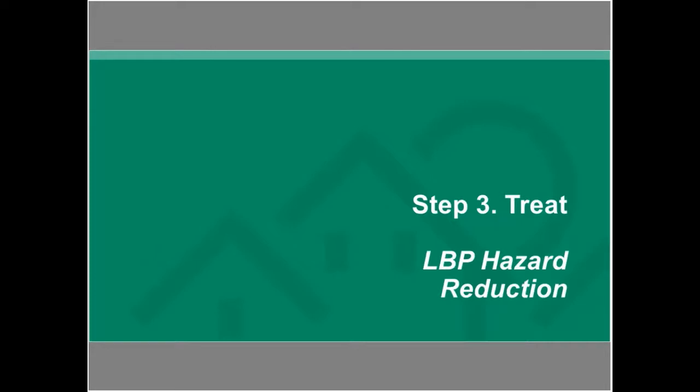Now, the nice advantage of a lead-based paint inspection is that information is good for the life of the building, and it can be used for any subsequent renovation work. Any contractor coming in can be provided that, and they would know what is and is not lead-based paint. So an important differentiation between a risk assessment and a paint inspection. So thanks for the interruption.